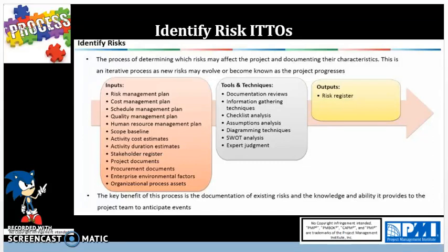Then you would have root cause analysis under information gathering. You want to determine the basic underlying reasons that cause a variance or a risk. Root cause analysis we'll discuss further down the road, focused on fishbone diagrams and cause and effect diagrams.